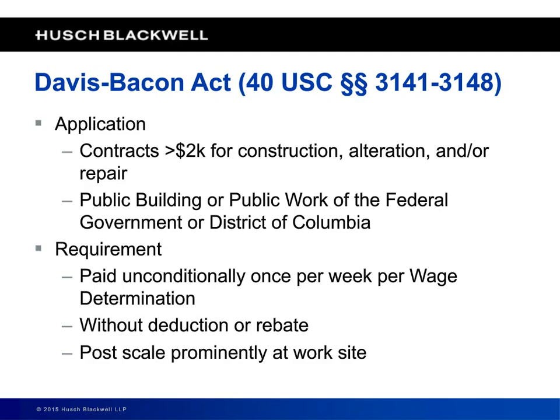So here are the basics of the Davis-Bacon Act. It's a very, very simple statute when you really look at what it does. The statute itself only requires a couple of things. It says it applies to contracts for construction over $2,000 of public works and public buildings. I'll come back to that in a minute. And then it requires three things to happen.